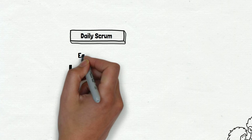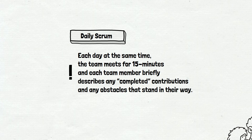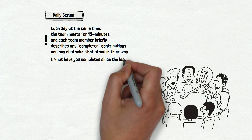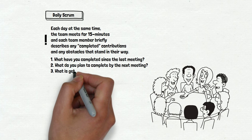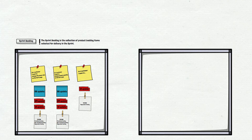The definition sounds like this: each day, at the same time, the team meets for 15 minutes and each team member briefly describes any completed contributions and any obstacles that stand in the way. It is another meeting, very often called a stand-up. It is short and should take 15 minutes or less. Even if it's not required, on most teams each team member answers three questions: What have you completed since the last meeting? What do you plan to complete by the next meeting? What is getting in your way? To visualize the result of these ten days of work, we need another board. There is a thing called the burndown chart or Kanban board — very useful tools to track daily progress. We are old-fashioned and use boards.